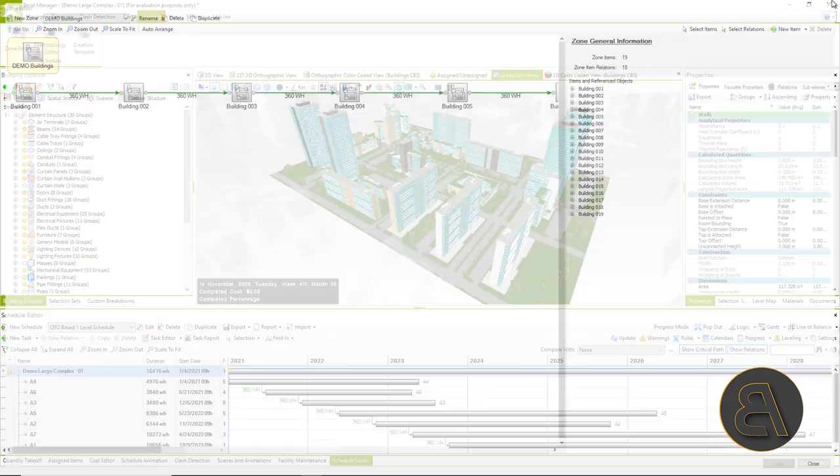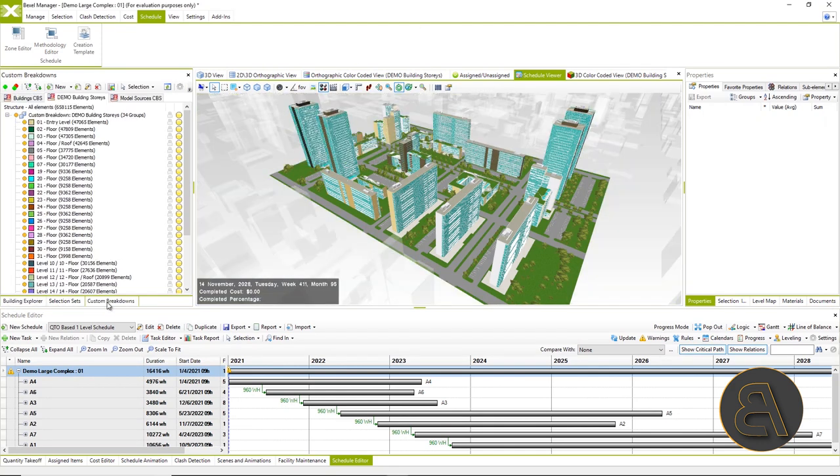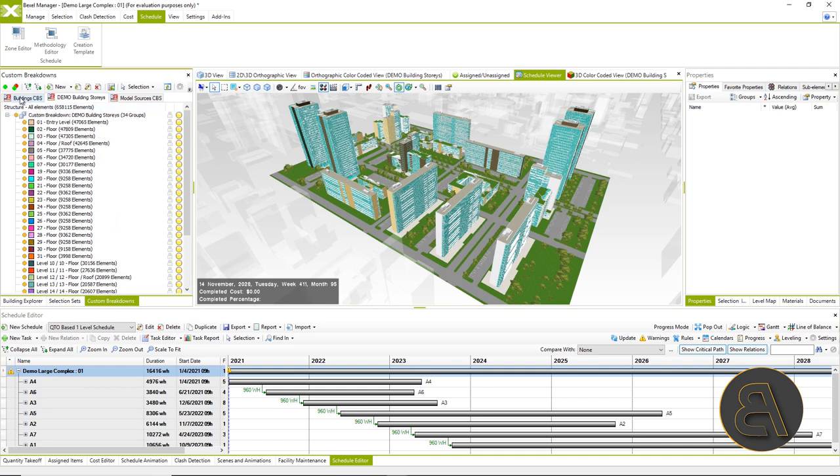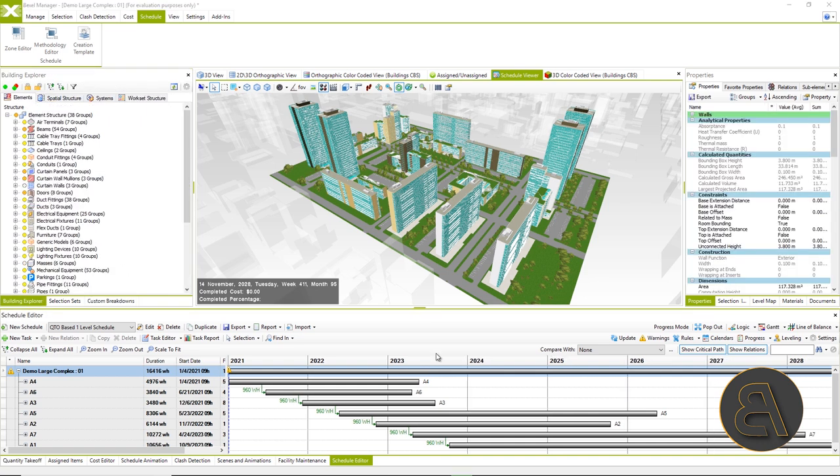Zones are obtained from selection sets made either manually or generated via custom breakdown structure wizard. That is, custom breakdown generated the elements according to certain properties such as level, building phase, etc.